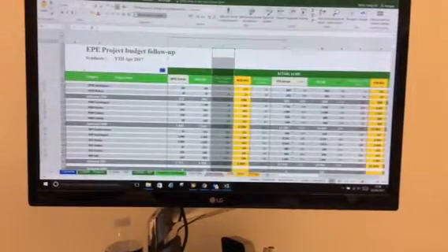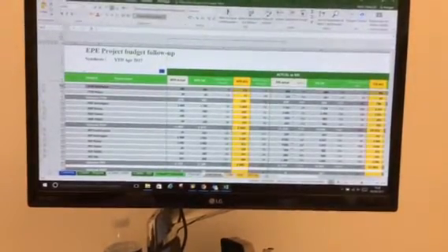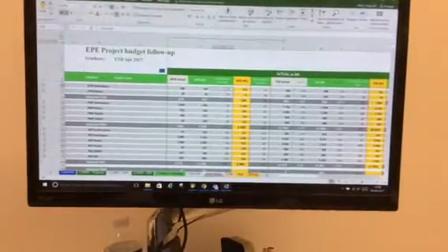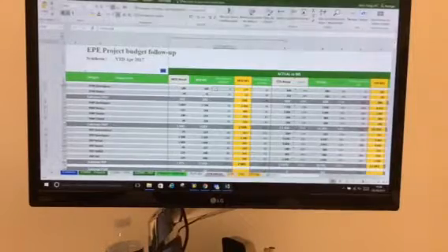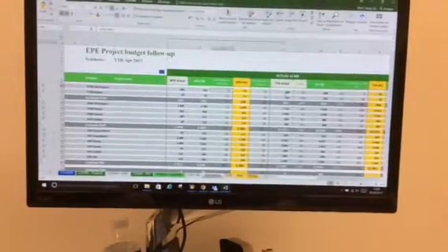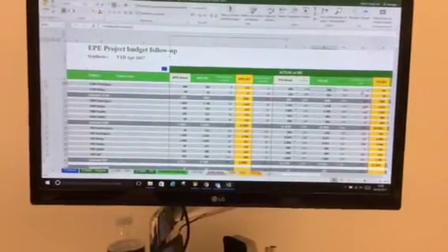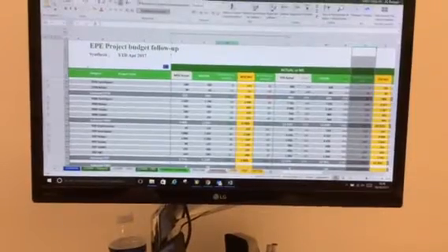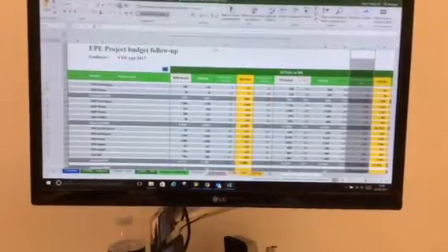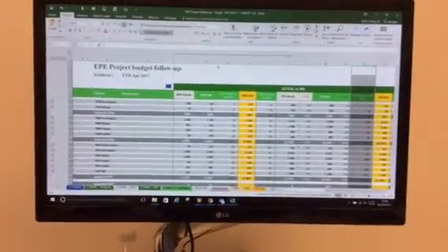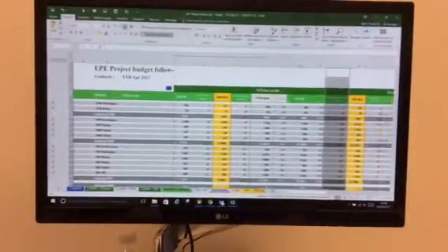If we talk about OTM switchgear, for example, it means that for the month of May, they're a little bit above what they were forecasted. 5 kilo euros for me is nothing. However, if we talk about the period from January to May, they're a little bit under. So that's why we have to take into account both to have the full picture.